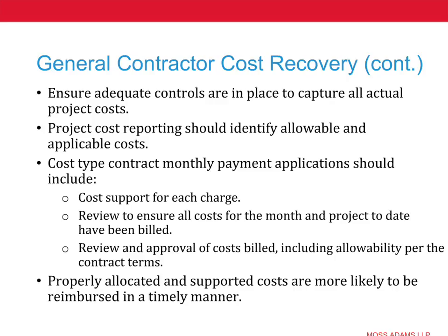to negotiate a fee for the job, and that's supposed to cover all your overhead costs. Well, in determining the overhead amount that you're willing to live with and the profit amount that you're willing to live with, you have to have a good understanding of the cost drivers for your overhead and what's causing it, and then how you're going to recover that overhead and how that's going to be allocated across your various projects, so that at the end of the day and at the end of the year, you've got a big profit on the bottom line and you've run a successful company.